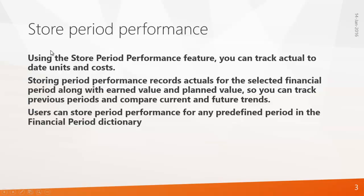And what is store period performance? Using the store period performance feature, you can track actual to-date units and cost. Storing period performance records actuals for the selected financial period along with the earned value and planned value, so that you can track previous periods and compare current and future trends. Users can store period performance for any predefined period in the financial period dictionary.